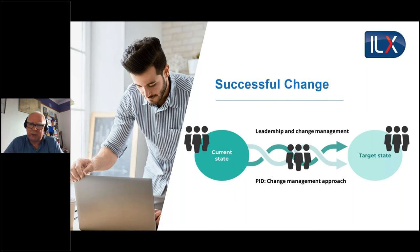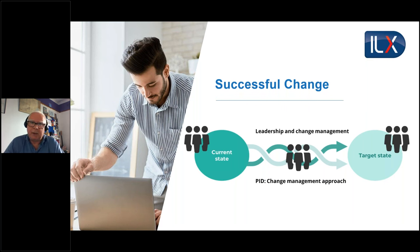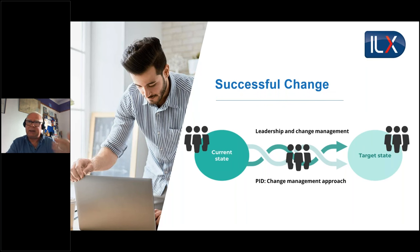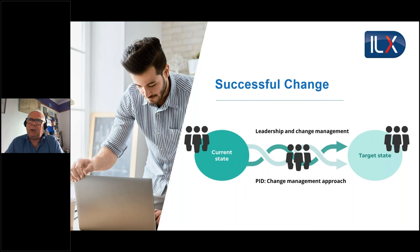This links into the benefits management approach - what activity is necessary for successful adoption of the output. It's about winning hearts and minds so that when we deliver and hand over outputs, we're delivering into fertile ground, with people trained and ready to use what's been created. An additional part of the Project Initiation Documentation will now be a change management approach, produced early in the project, triggering stakeholder engagement and communication activities to ensure people are ready, willing and able at the end.